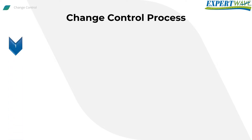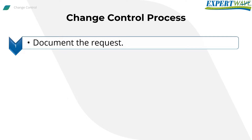Usually the process starts by documenting the request — we ask the customer to write down whatever she wants to change. Many times the customer drops the change just because she doesn't feel like writing it down. They can quickly request a change verbally, but if it requires writing it down, they'll say they'll give it more thought and usually never bring it up again. This is a huge plus for us, as many customers request changes just for the sake of it.